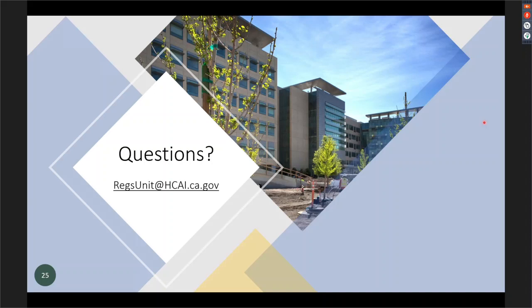Again, I'm going to always clarify that with, if there is something significant that triggers a question, it may go into a different category. As a general rule, an OPD is already approved. It's a pre-approved detail. It can be added to your project. Now, if the compliance officer looks at this and you have a wood frame detail going into a metal frame building, they're going to question, are you sure you want to do this? You have to look at each one, but as a general rule, yes, they will be added to the drawing as an NMA.